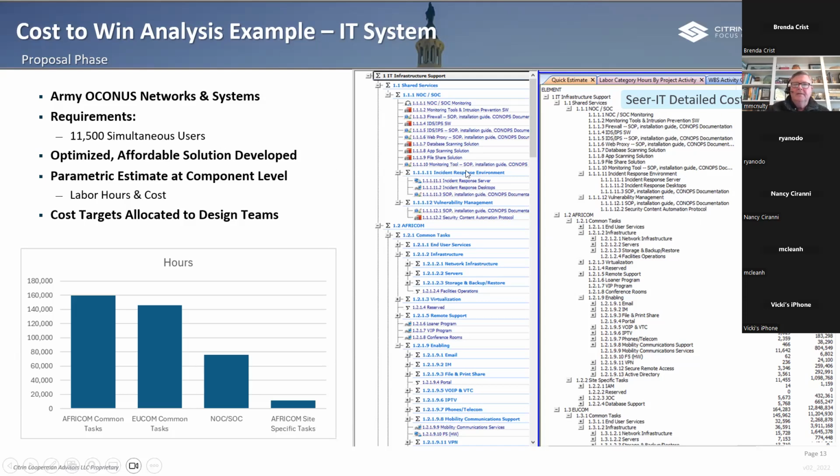And this is at the design phase. This isn't actually doing the work yet. This is going to go in the proposal. And again, you'll go through the horse trading of what costs are associated with which parts, so that we can stay inside the individual cost envelopes and the overall cost envelope for the program, so we can move forward in a good disciplined manner toward winning the proposal.